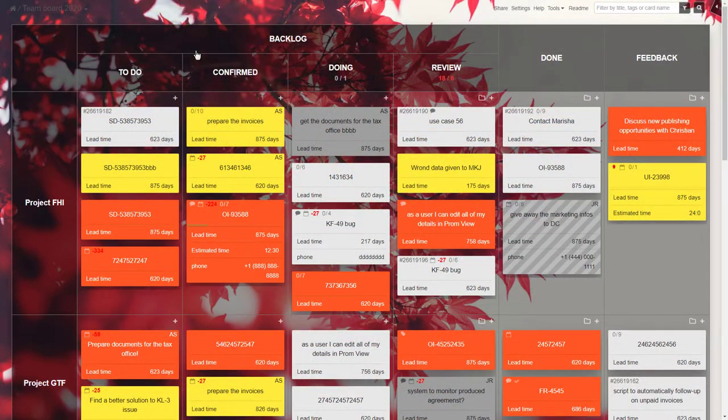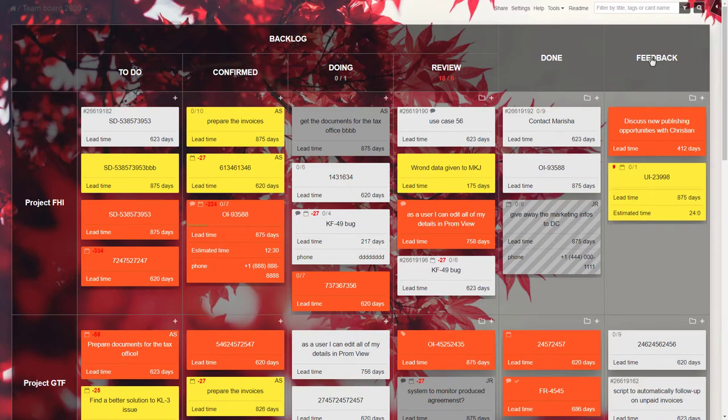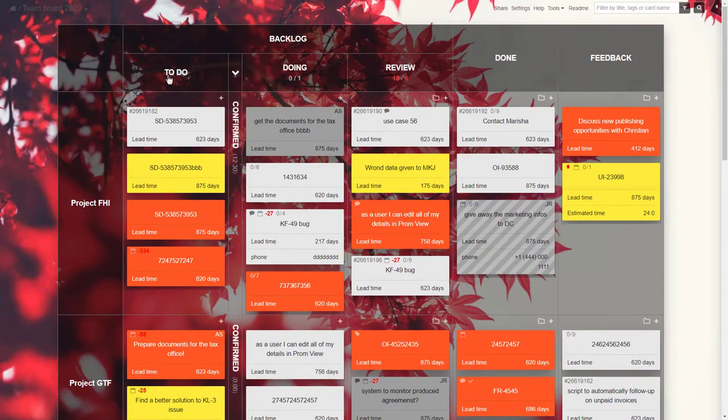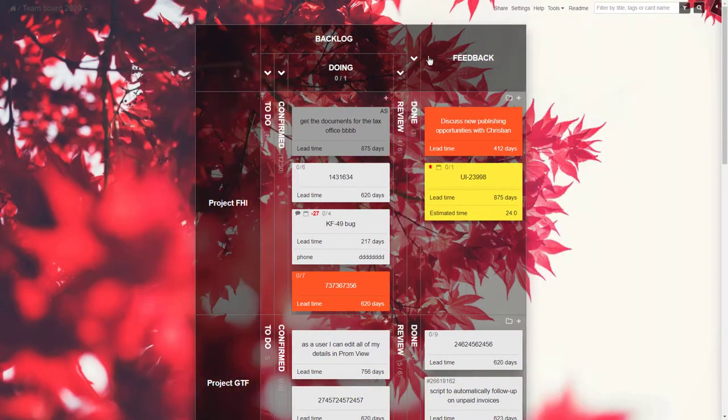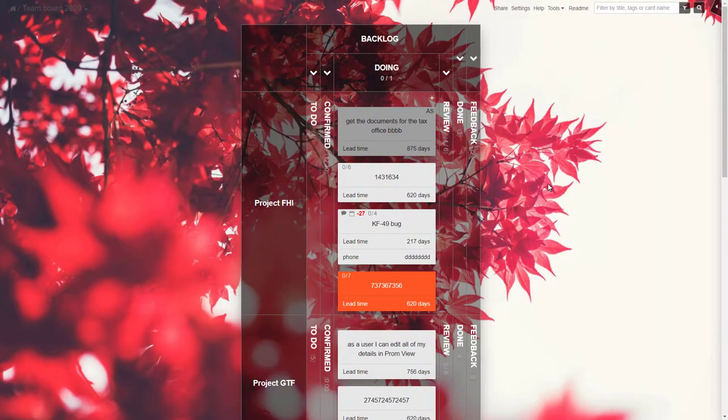The idea behind Kanban is very simple. Split the workload into stages and then limit how many items can be processed at one time.